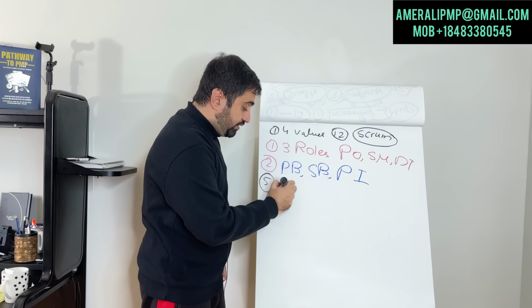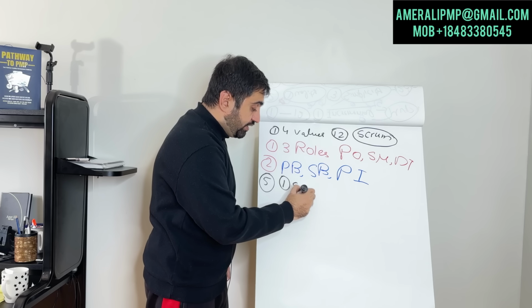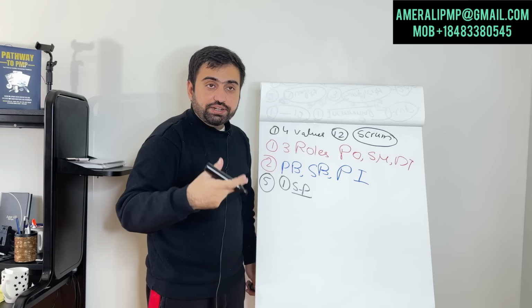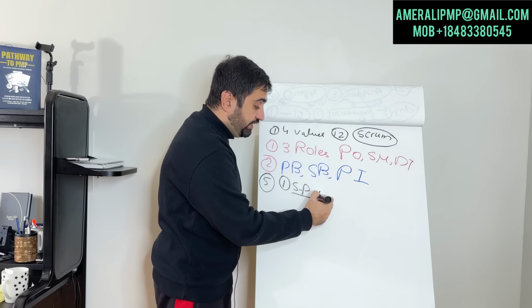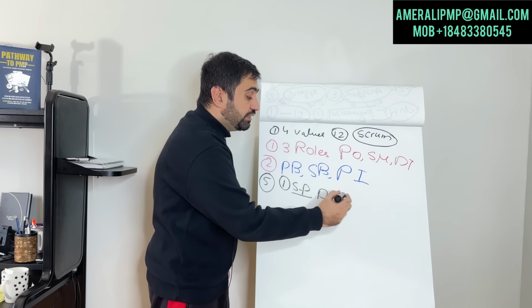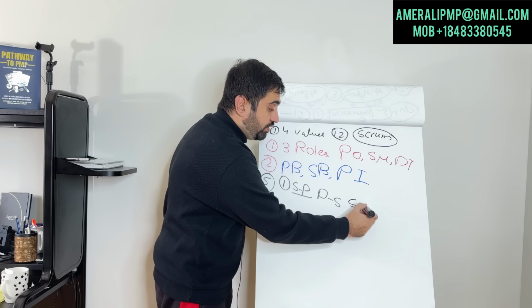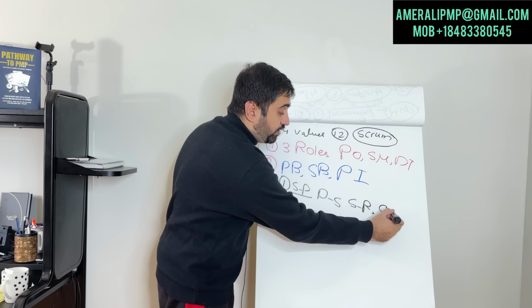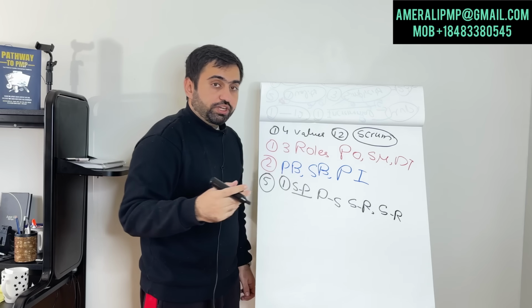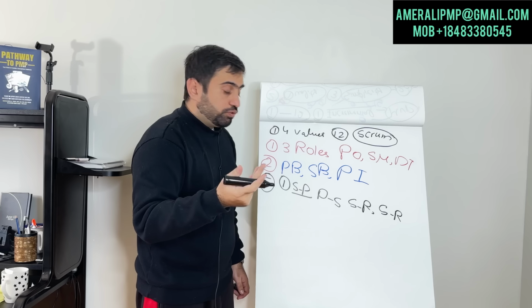One is sprint planning, in which we actually plan the entire sprint. The second is daily stand-up. Third is sprint review. Fourth is sprint retrospective. Now the fifth one is sprint itself.